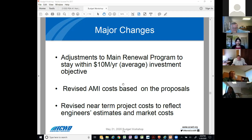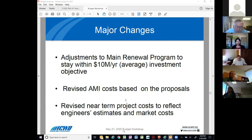Highlights on some of the major changes during the mid-cycle update: some adjustments were made to our main renewal program to stay within our $10 million per year objective. Revised AMI costs are based on the proposals received, and we have revised the near-term projects to reflect engineers' estimates and true market changes.